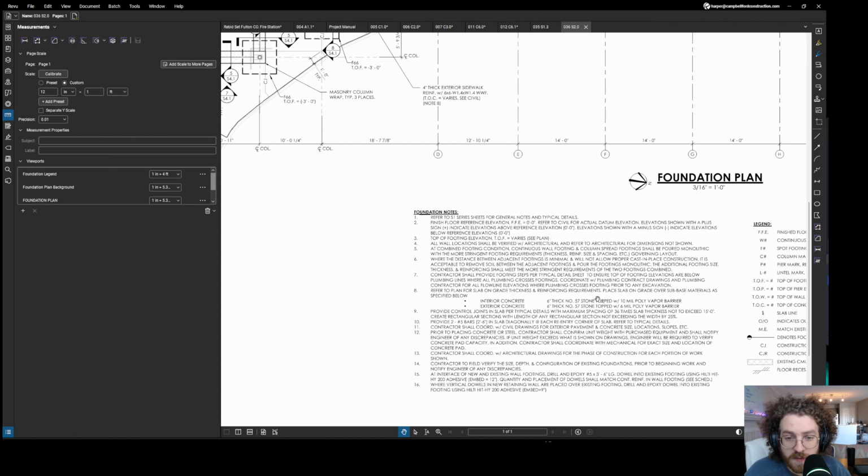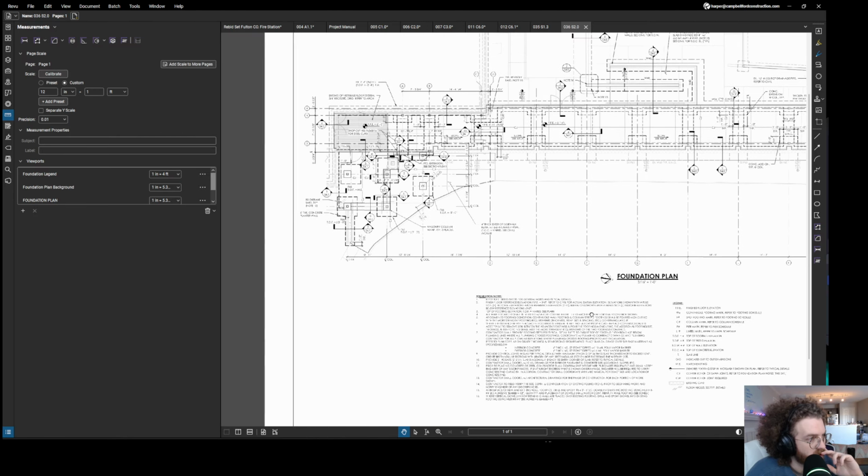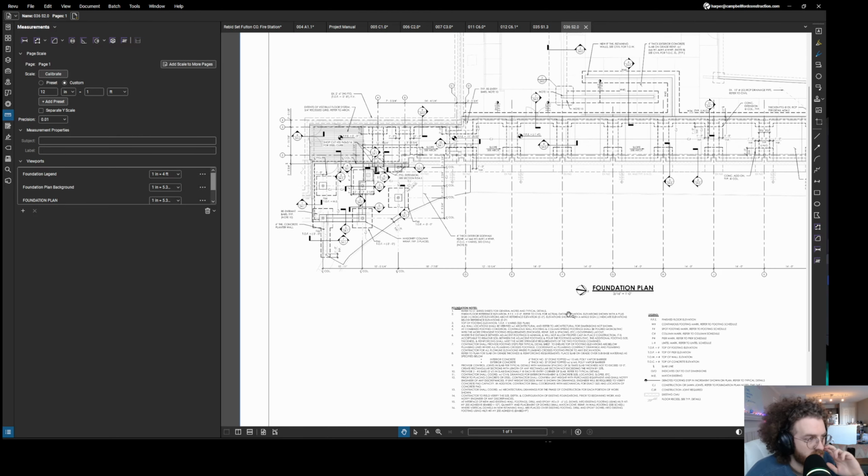So we wouldn't figure it for the exterior concrete because they didn't show it in the detail. But for the interior concrete slab, we would figure 6 inches thick of granular fill. And the 10 mil poly vapor barrier is just standard on pouring interior slabs. That's just an additional moisture control that you always do, at least in America, on slabs.